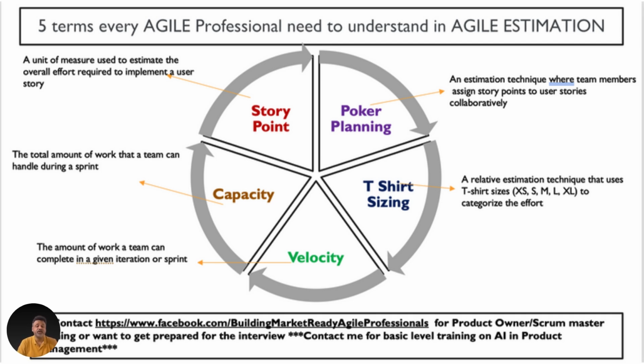And the last but not the least important term that you should understand is t-shirt sizing. T-shirt sizing is a more high level sizing which can have a little higher error margin. It is generally captured at the epic level. More precisely, story point is at the user story level, whereas t-shirt sizing will be at the epic level. You will have less information, but still you will like to be able to size something, to know what it will take to complete.